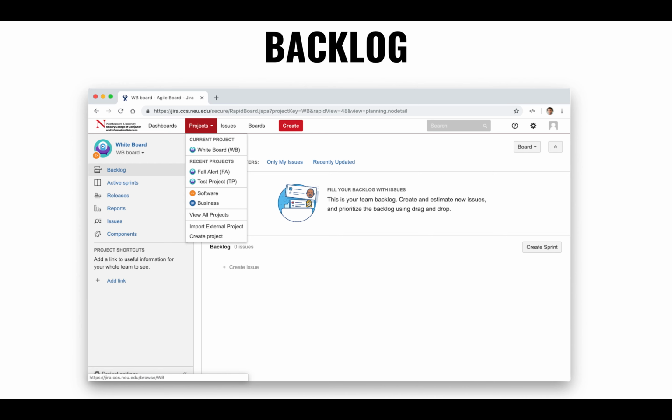It's also where you can create new sprints, right? So every week, like today, you'll create a new sprint and, presumably, you'll have a sprint planning meeting and start identifying the things that need to get done. This assignment suggests a couple of stories. I think one design story, one research story, one user story, something like that, per developer.